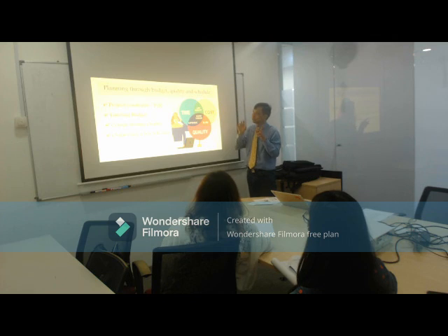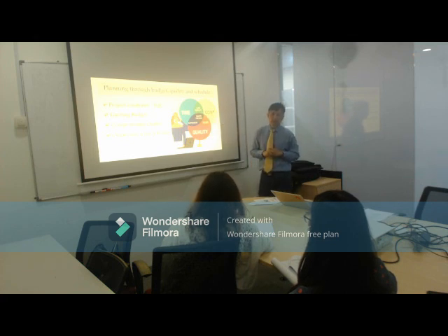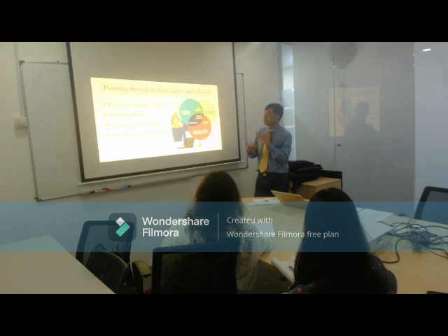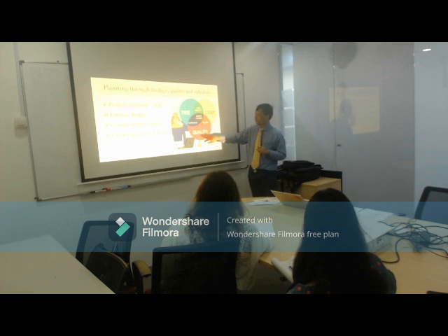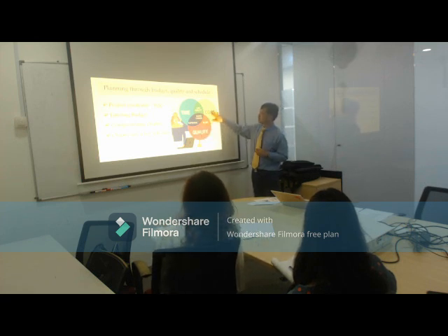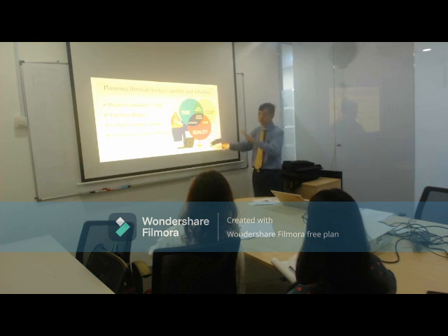Okay, so now we come back to here, you can see that the combination of this will decide what type of project that we have. For example, if we have time and cost, then we may need to have low quality. I mean, we have to sacrifice for the quality of it. So that's our constraint. But if on the other hand we want something of quality with cost involved, it might take time for us to complete the project. Because we say, oh, we want it to be very nice.